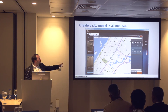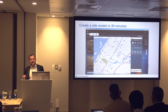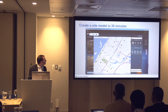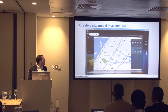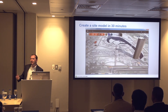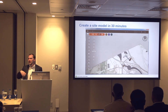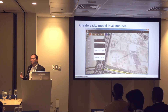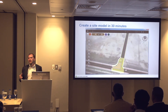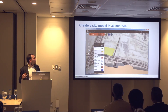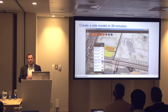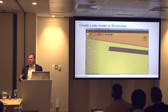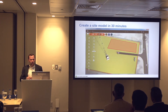It brings in lots of different data formats — Revit models, IFCs — and you can start using it to quickly sketch what your construction site is going to look like. You can identify which areas you're not going to be able to walk in because there's going to be machinery there, and start putting in barriers to make sure you've got the appropriate security around the site. Within half an hour, rather than sketching it on a 2D plan, you've got a 3D model to show what you're working on. You can start adding 3D content — cranes, trucks, materials. Anything you can turn to an FBX file you can bring into the application, including toilets and site cabins.